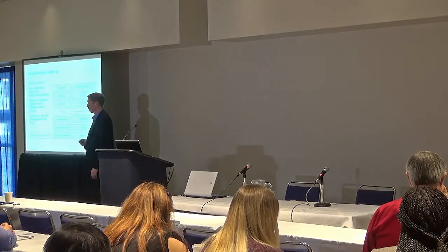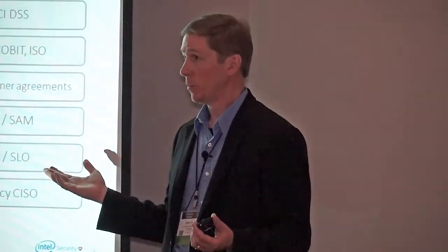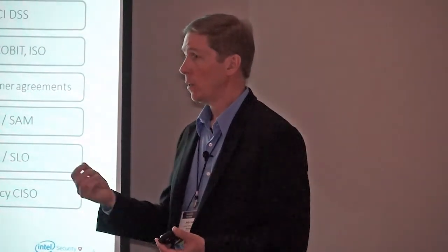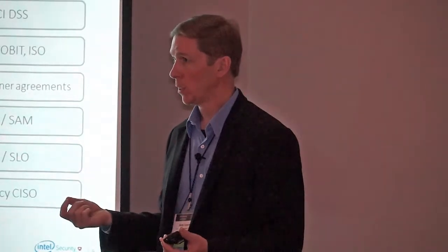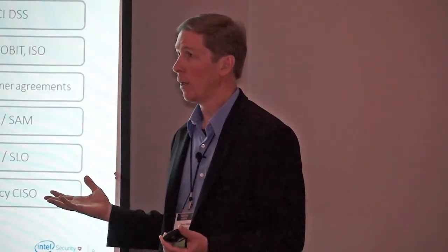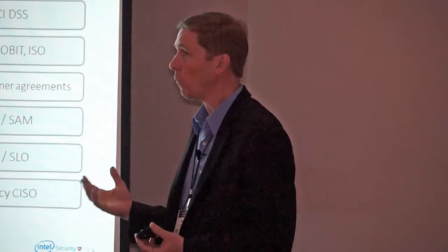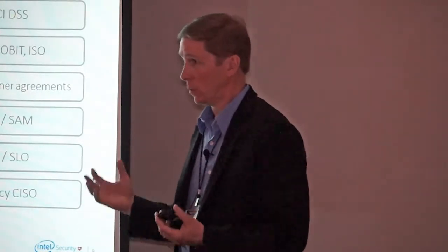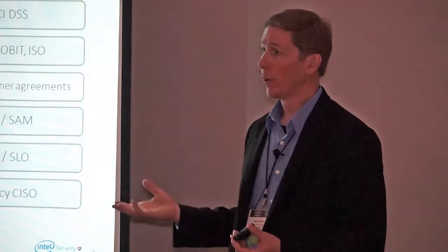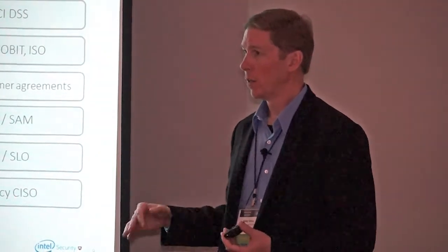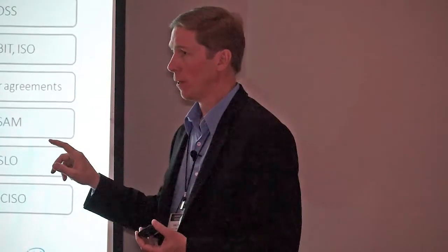For the existing projects, before the system goes live, there should be an acceptance process, a risk assessment, and a vulnerability assessment before the system goes live. At that point, hopefully, your audit group and your compliance group will identify that there are required controls that are missing. Unfortunately, you might have to go back through the design phase. So it's why it's important to measure twice and cut once.